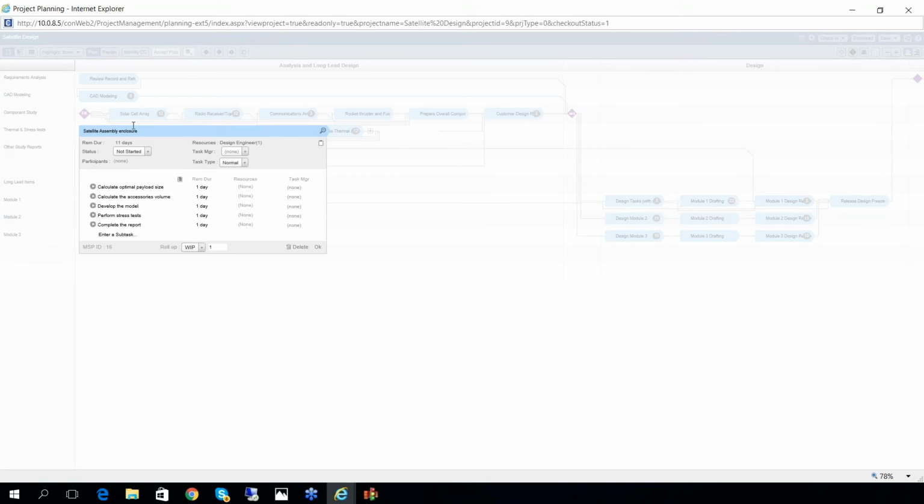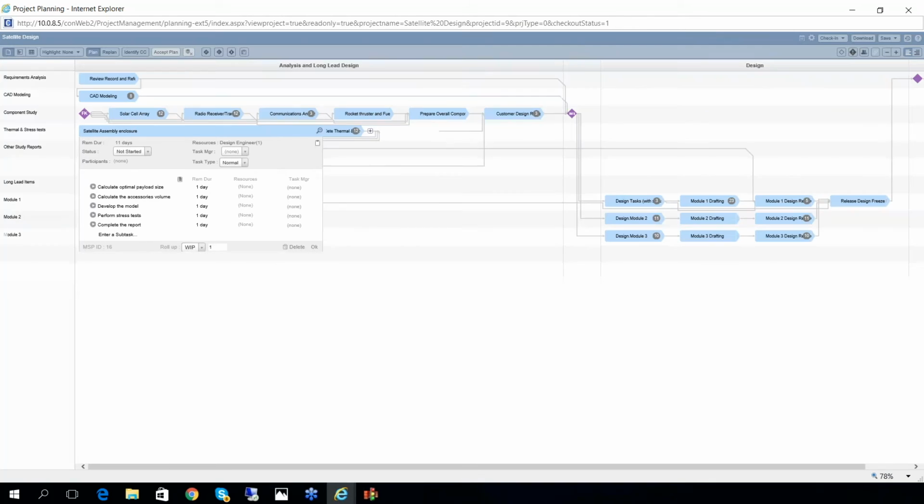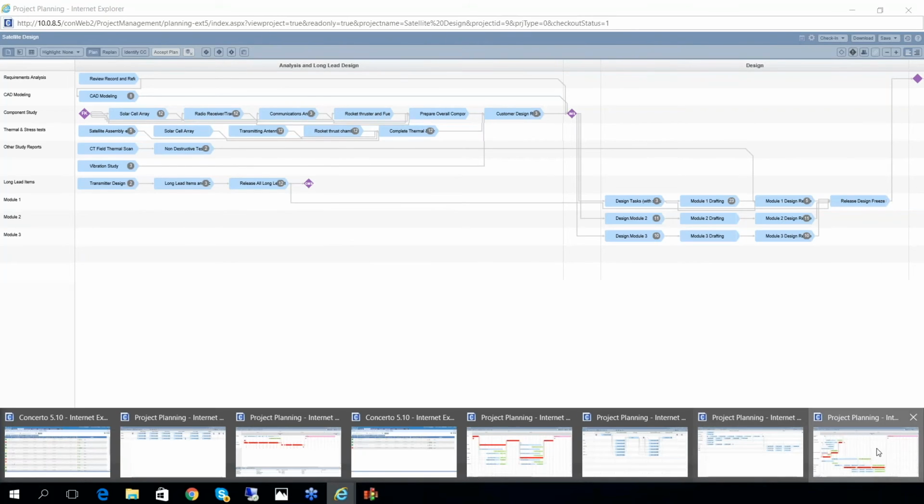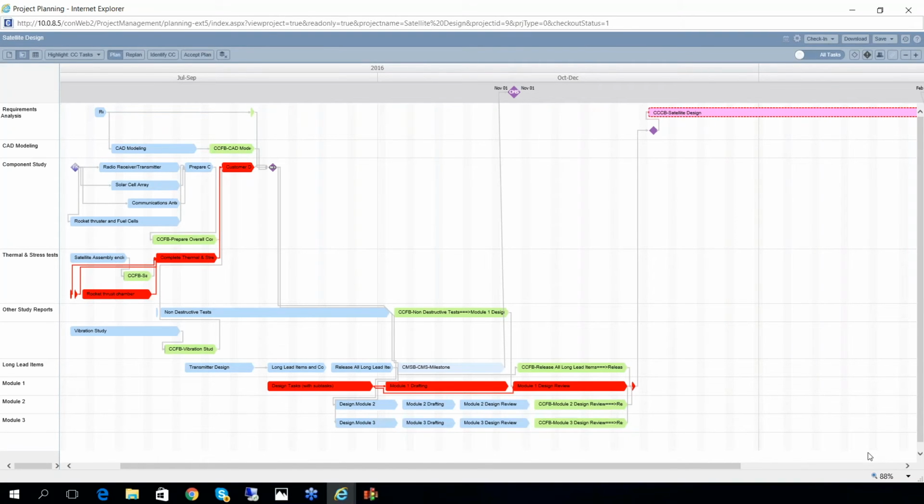And I think, so again, let's look at the timeline view here. Again, what you see is the critical path, which is the red tasks, is 6 tasks. And by definition, this project plan is going to be much more stable. This critical path is going to be much more stable. And one more advantage you get out of all this is that when you reduce the number of tasks, you actually have a visual project plan that you can hang on your wall, and everyone can look at it and really understand what is going on inside a project.